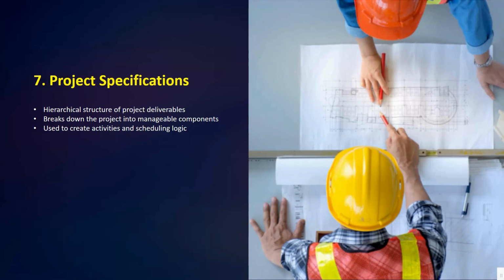Specifications provide the technical standards for material, workmanship, and execution. They guide the quality expectations, and also help in estimating the time required for certain tasks. So if specifications require higher quality or more complex methods, the schedule will need to reflect that.